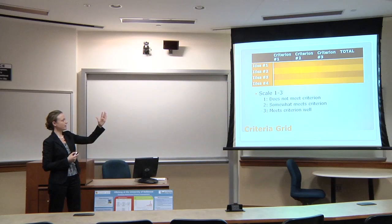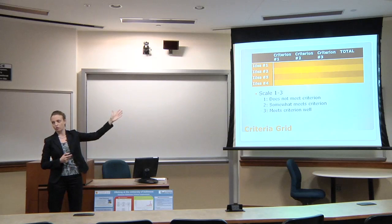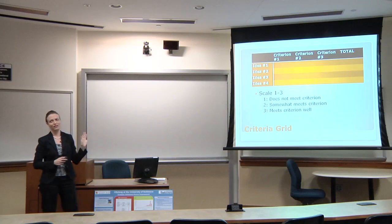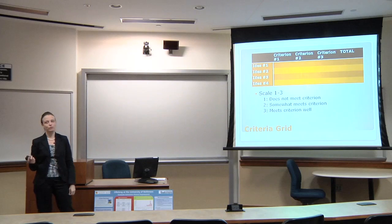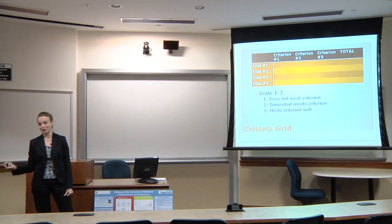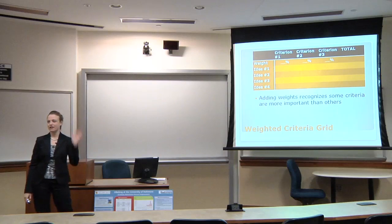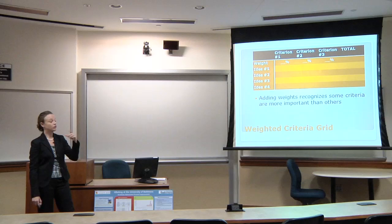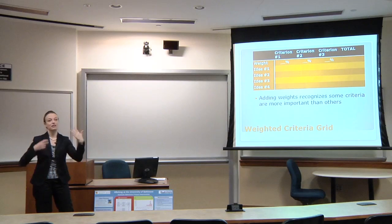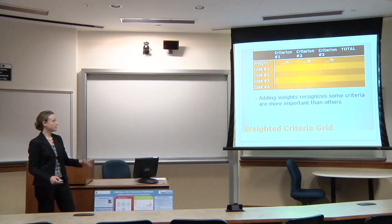So you'd come up with the criteria, you rate each idea, and then you see which tasks get the highest totals on the criteria. Usually just a scale of 1, 2, or 3, like it either meets it or it doesn't, is a good way to go. When we rated our criteria in my class, some ideas got 0 points, so you can also give 0. You can also weight the different criteria. Say the most important criterion to you is getting the project done within the allotted amount of time. Maybe that's going to get 50% of a vote, and the other 2 criteria you come up with are going to get 25%. That's another way to do it.